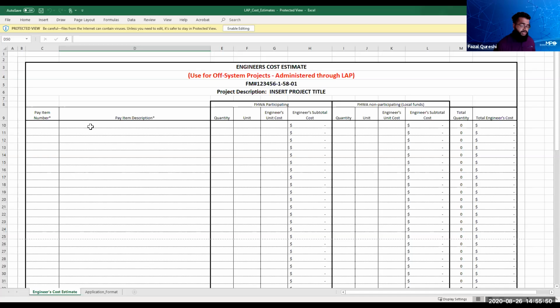For a lot of these pay items, just so when we're vetting and verifying these costs and these quantities, if you can, please turn in any supporting documents for how these quantities were calculated. For sidewalk, the linear footage multiplied by the average width of the sidewalks. That would be very helpful.